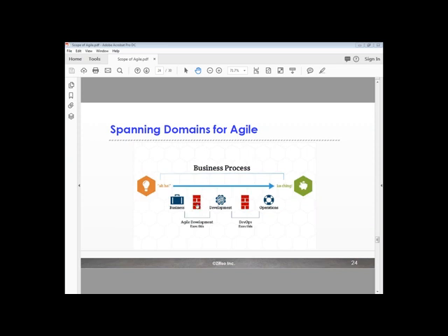But we're saying that we're going to release every couple of weeks. If we don't have a plan for how we're going to pass this down the pipe to get it up in production, if we don't have coordination with operations, then we can be as fast as we want on development teams, but the business isn't going to see the results because we're going to just end up in this long queue waiting for approvals and production releases. So DevOps is definitely an approach that can help fix this.